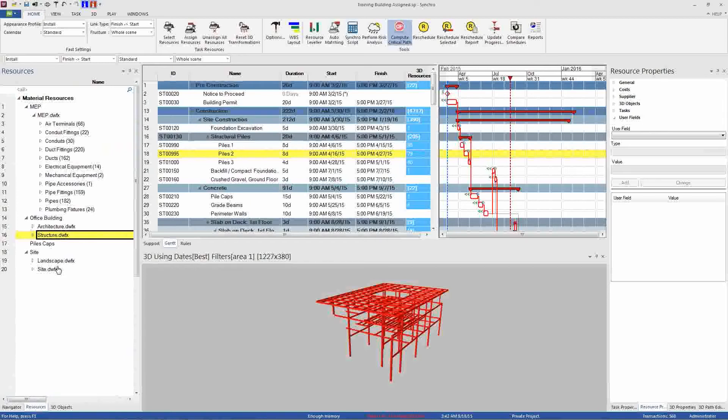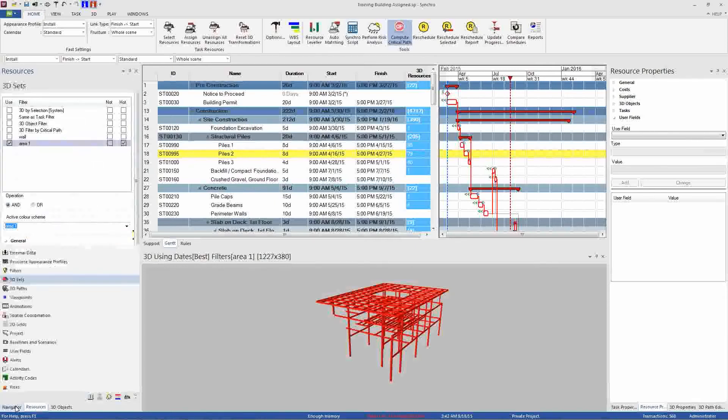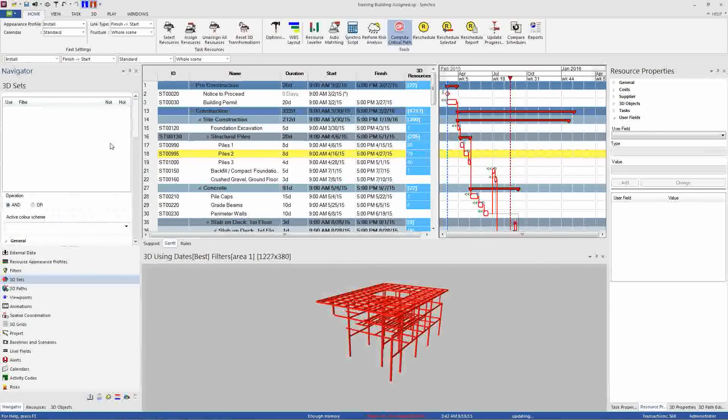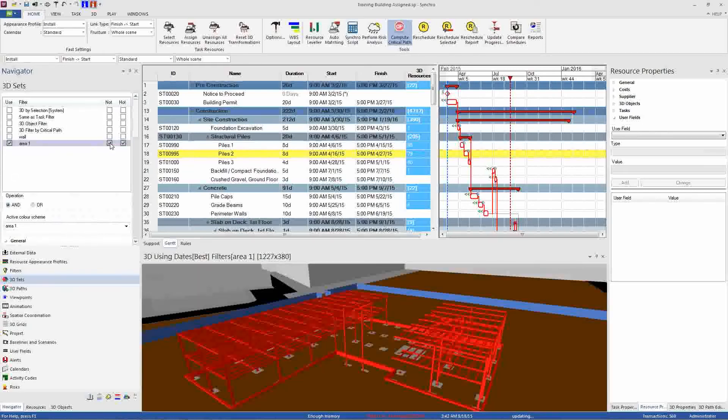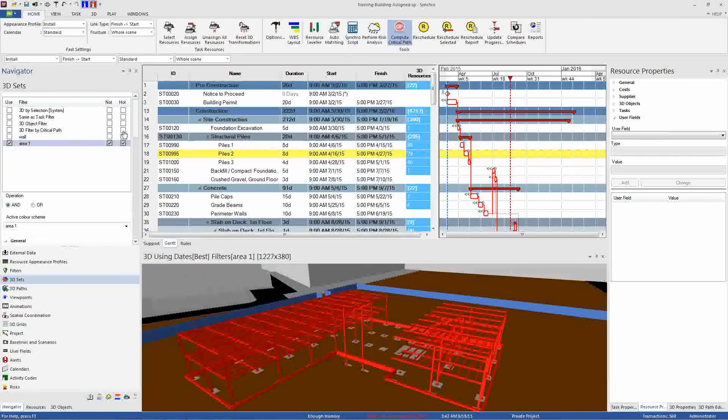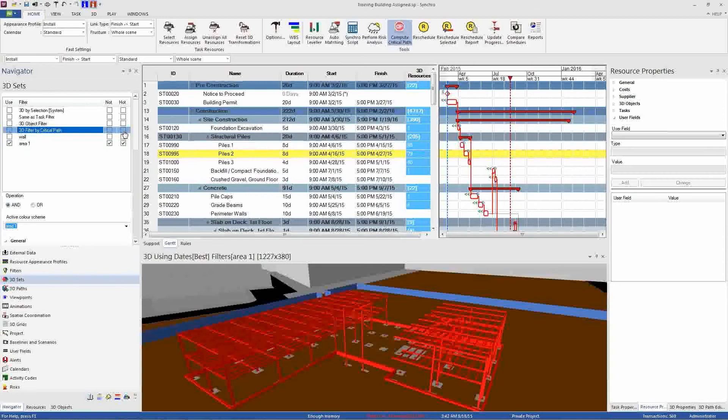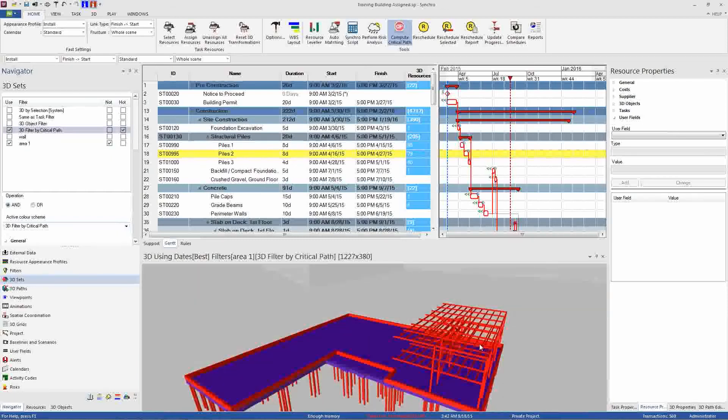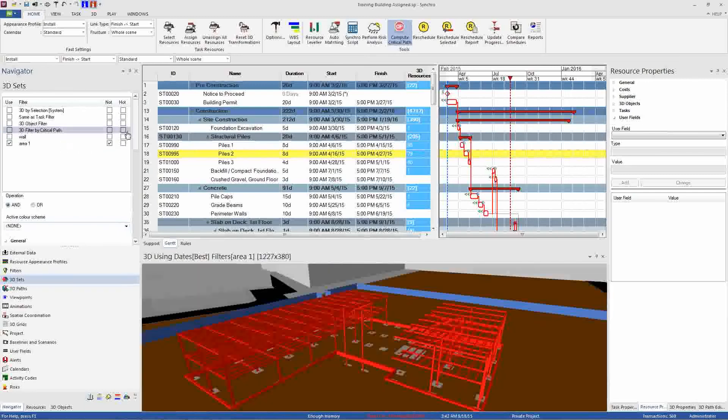Okay. Next question from Alex. In the 3D sets, can you describe the NOT and HOT checkboxes? Sure. So in the 3D sets, these are actually going to be renamed in our next version in 5.1 that comes out next month because we have gotten questions about what this means. So NOT is an invert. So it's the opposite. So it's everything that's not included in this filter. So if I turn that on, it's everything except what I had filtered before. So it's just an invert. And the HOT is the color scheme. So when we were looking at that critical path filter that had a purple color scheme. So if instead of using this particular one, I turn on the HOT, the color scheme for the critical path filter, I'm going to see everything in purple. It's the same thing as this active color scheme. They did the exact same thing. So there's that color scheme that we had before. So that's what the HOT does. It's just the color scheme, whether or not that's active.